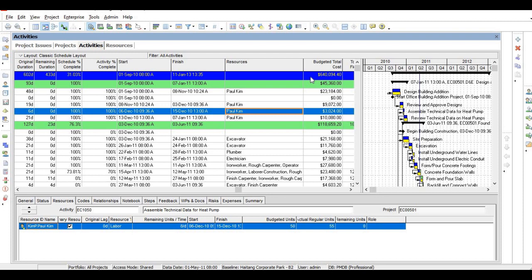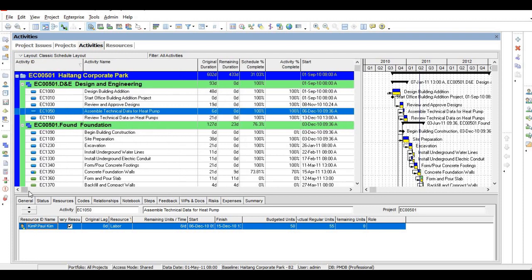So this is called planning, scheduling, and budgeting. Primavera and MS Project are basically used for planning and scheduling. Project planning, scheduling, and budgeting are carried out before starting the project. So you have to create this schedule, and once you create it, you have to give the schedule and budget to your client or top management for approval.